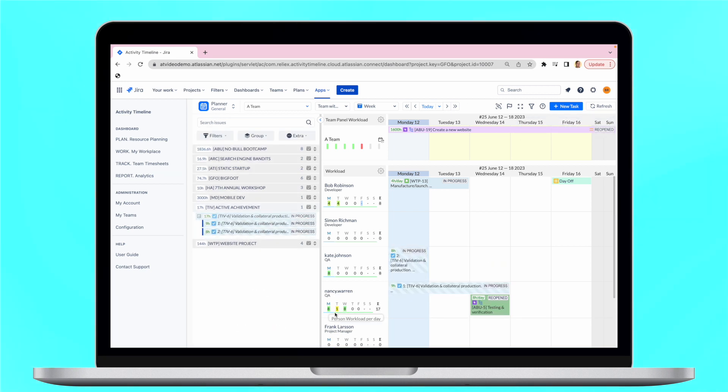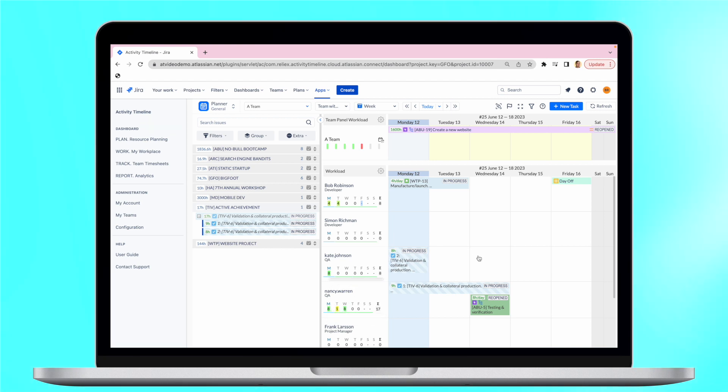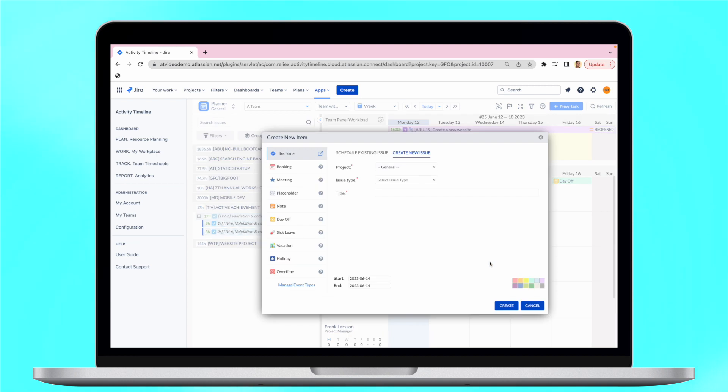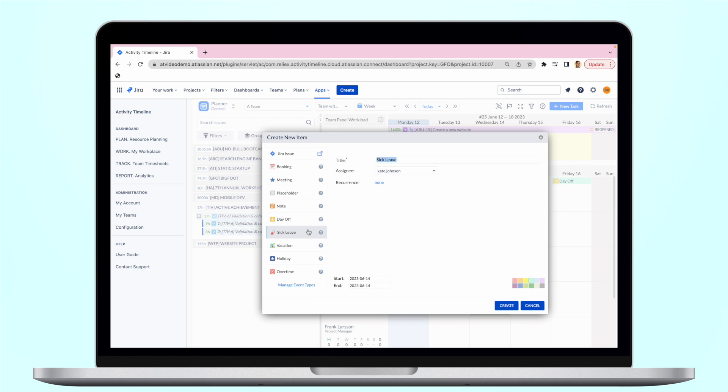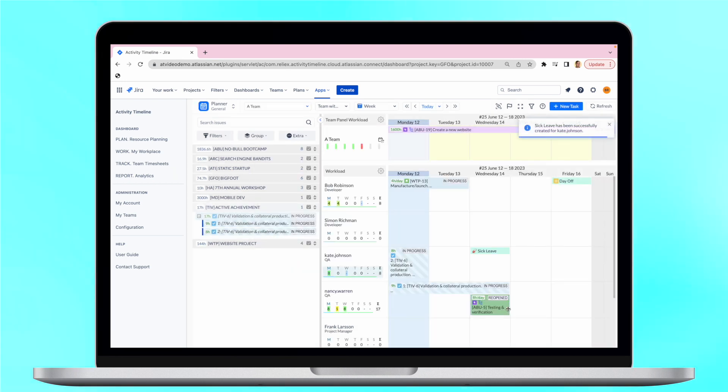All users have special workload indicators that help to understand whether the user is underloaded, overloaded, or the workload is perfect. Schedule new Jira issues directly from the dashboard or use internal custom events like sick leaves and days off for effortless holiday management, and the workload indicator will be updated accordingly.